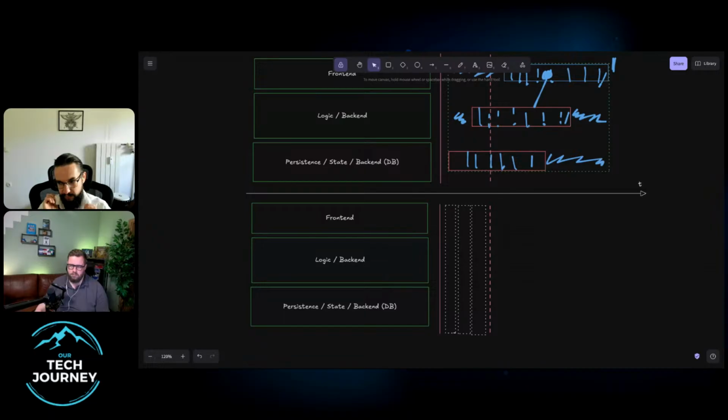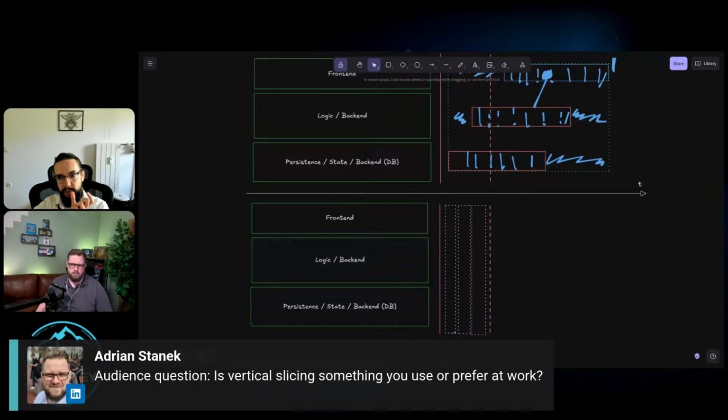And usually when you're encountering tickets like this, it's completely okay for you to slice it up internally within the team and then say, yeah, all 3 of them are finished when we did 4 slices, because now it's scope complete to what the ticket said. You don't actually have to break up the tickets to create this parallel, because it's just going to create more bureaucracy. Again, it'll make the board pretty, but you want the board to be empty, not pretty.